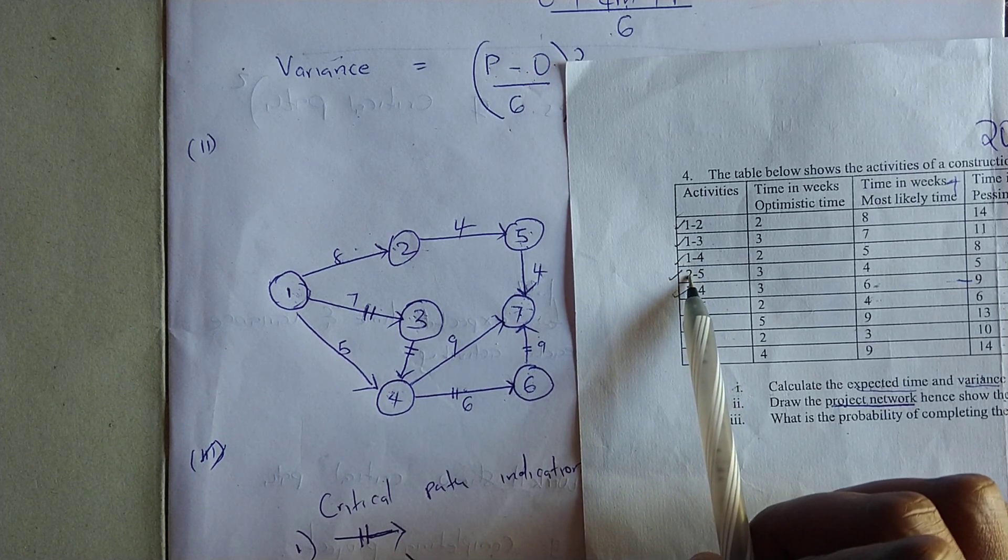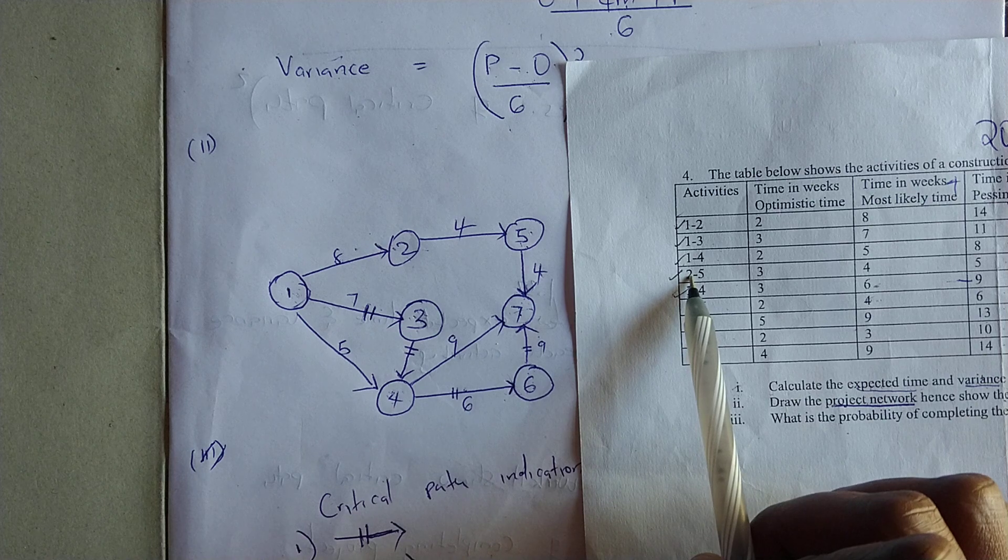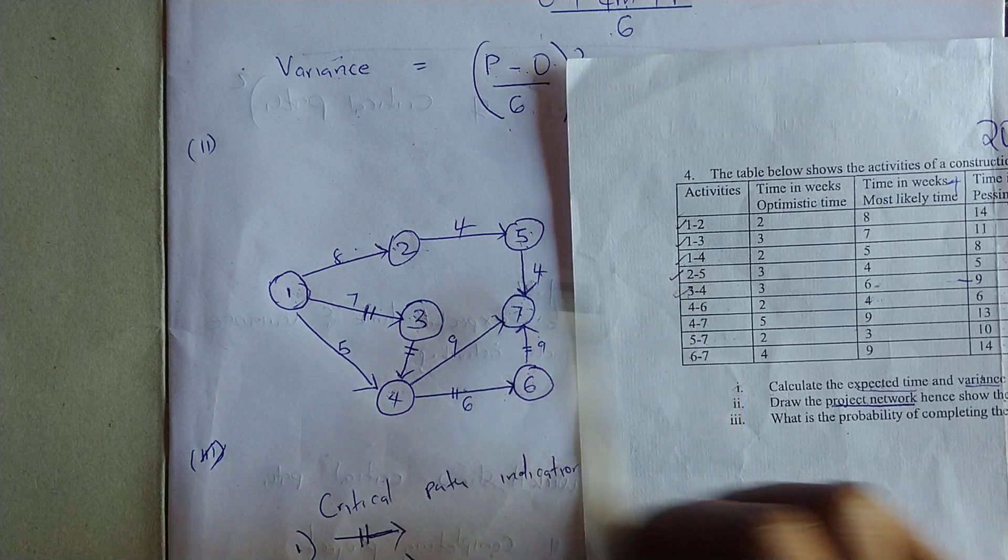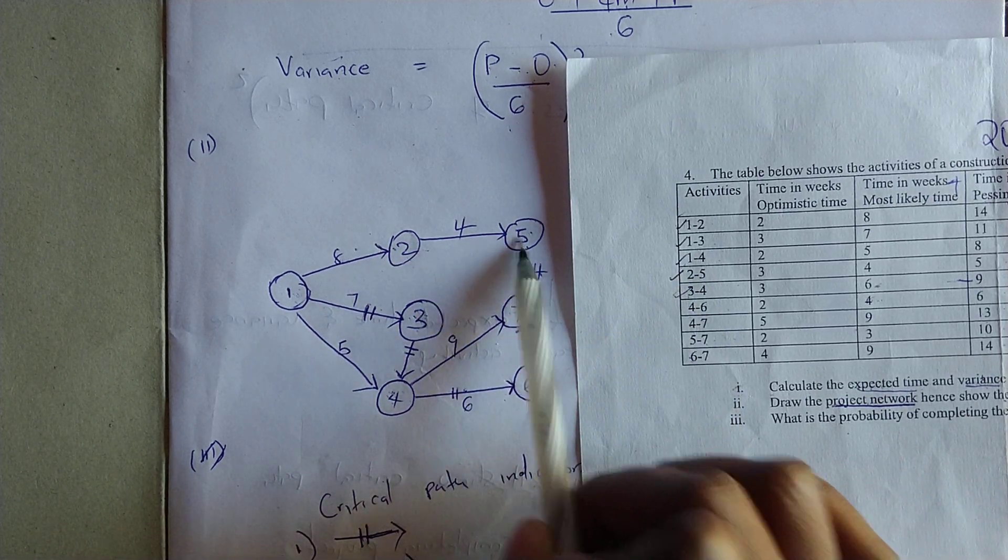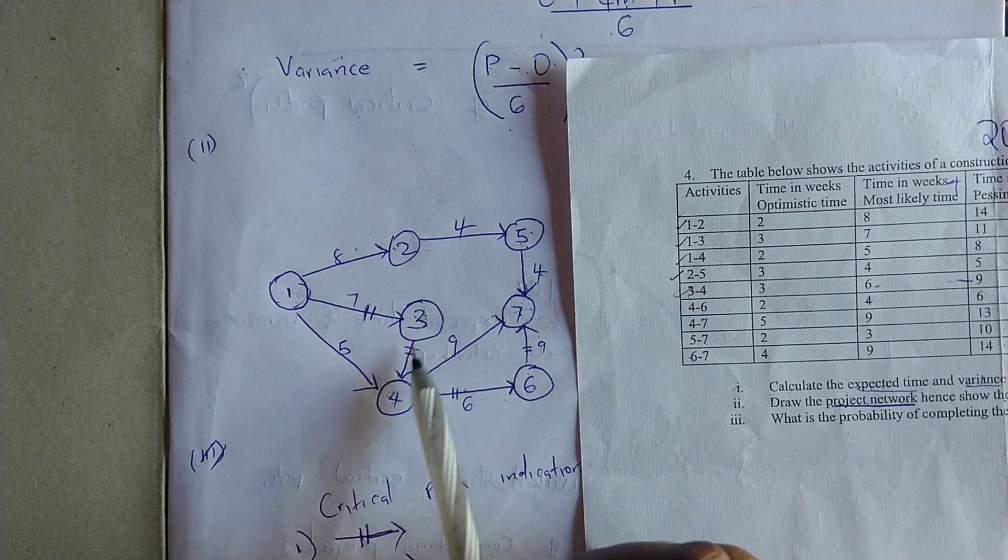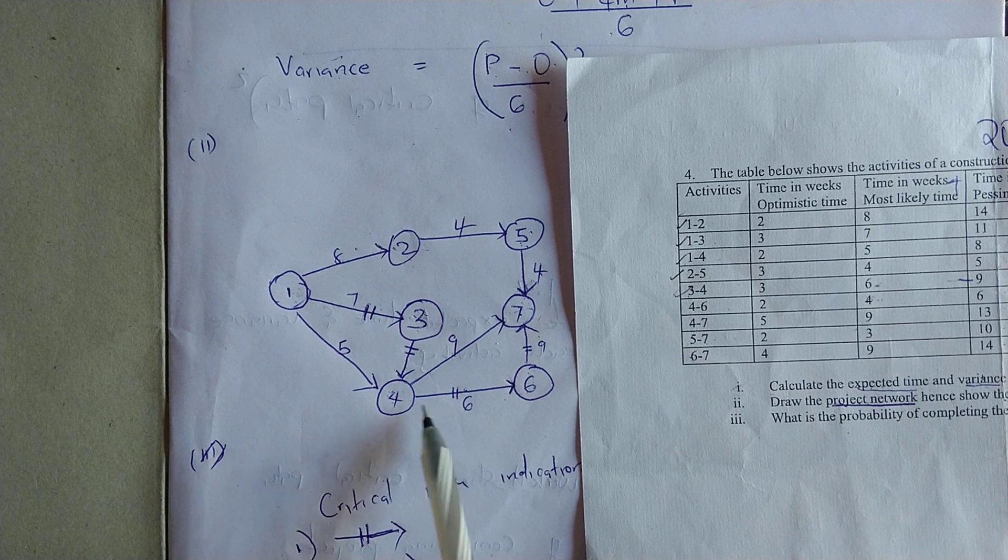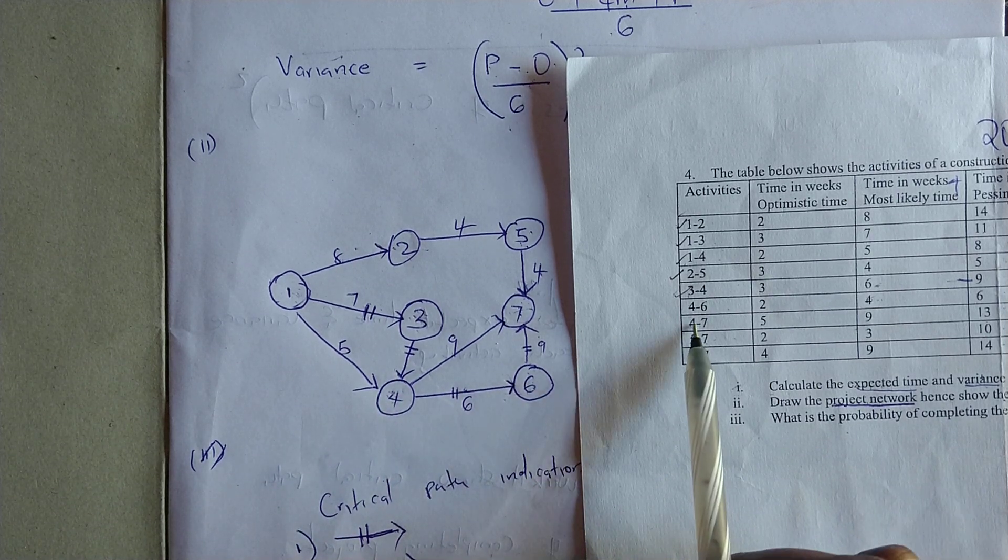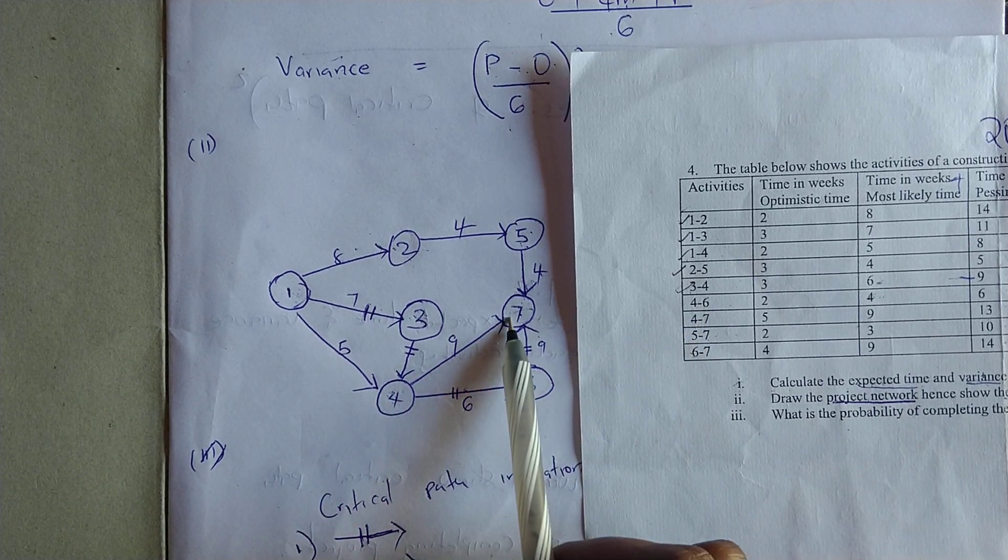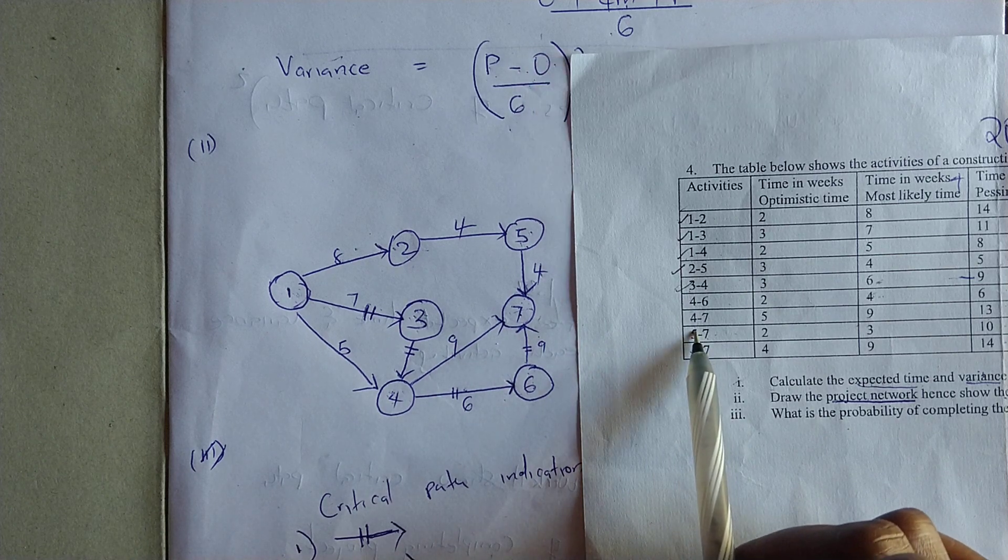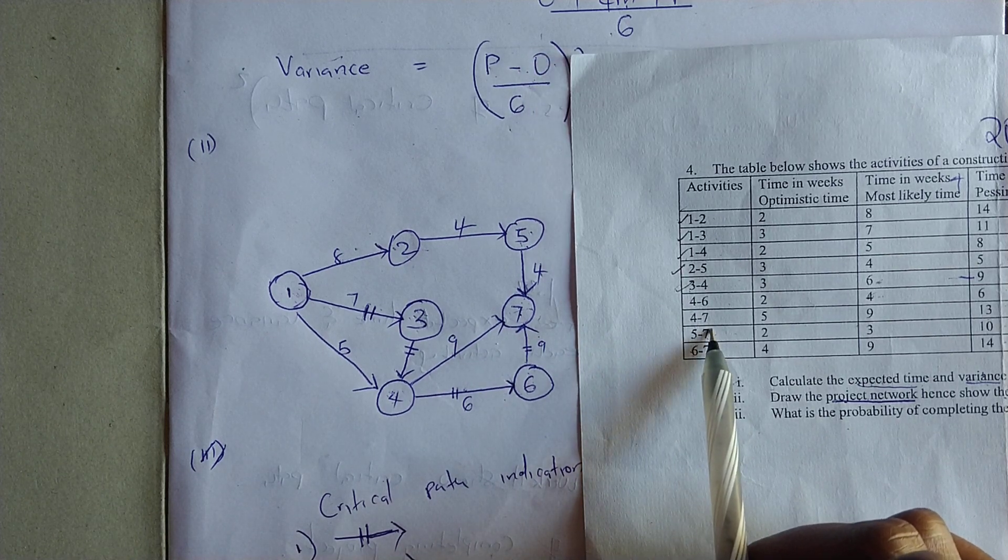Then we have activity five that will come from activity two, so from two to five. Then from three we have four. From four we have six. From four we still have seven. Then from five we have five to seven, and from six to seven.